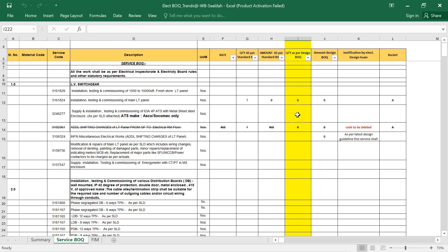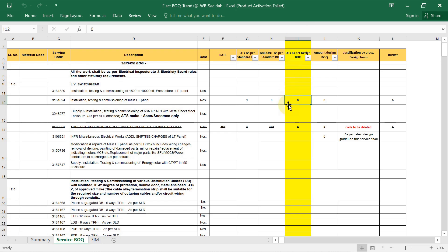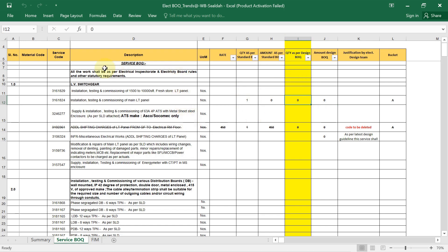Our main target is to fill the quantity column — whatever we have calculated for the mall project, we write down the quantity as per design BOQ. The amount is based on market price, so rate and amount are entered accordingly. Our main target is to fill the quantity as per design.